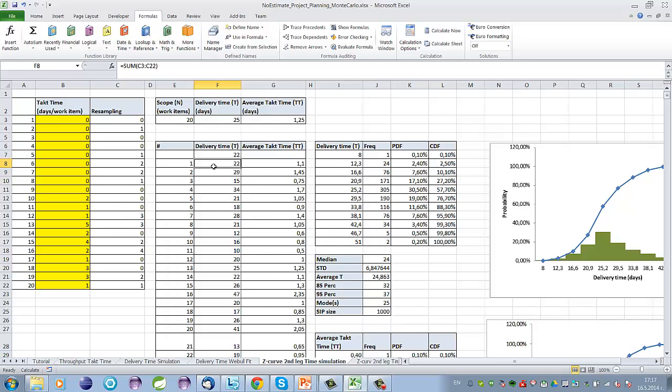In the respective column, we have 1000 runs, and Excel automatically will first generate a random sample, then sum up all of the takt time data, and as we know, the sum of all takt time data will give us the total length of the project, and it will end up here, populated 1000 times.